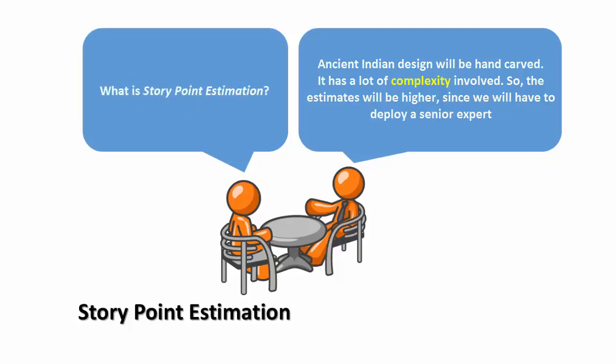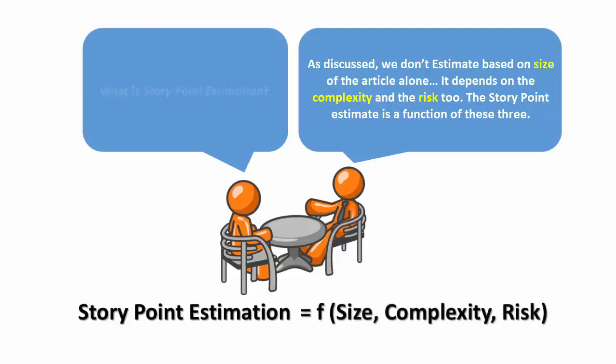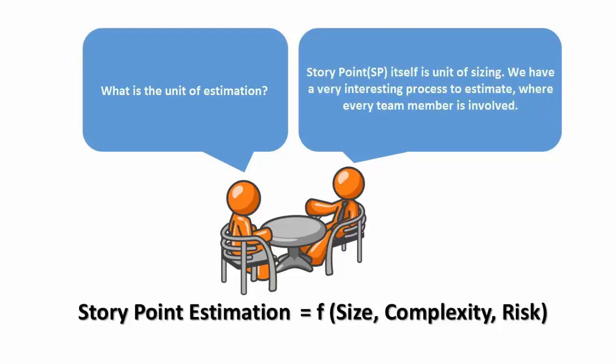What is story point estimation? As discussed, we don't estimate based on the size of the article alone. It depends on the complexity and the risk too. The story point estimate is a function of these three. What is the unit of estimation? Story point itself is a unit of sizing.